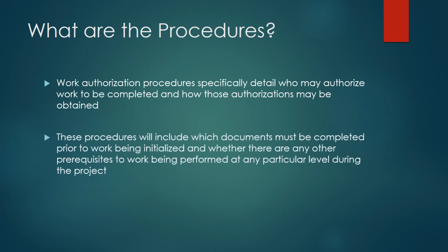And these procedures will include which documents must be completed prior to work being initiated, and whether there are any other prerequisites to work being performed at any particular level during the project. So this is why procedures are important: you've got documentation, you've got the prerequisites of what work needs to be done and how it can be authorized. And this is what we are talking about when we say procedures in the definition of the work authorization system.